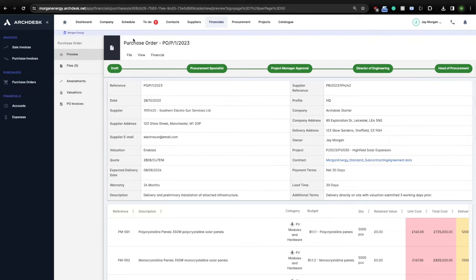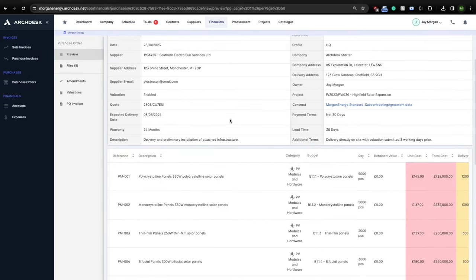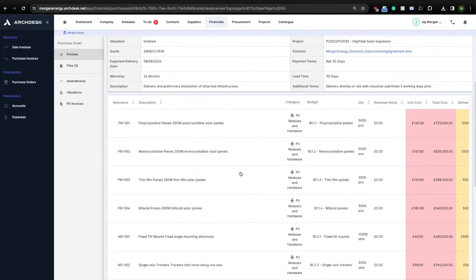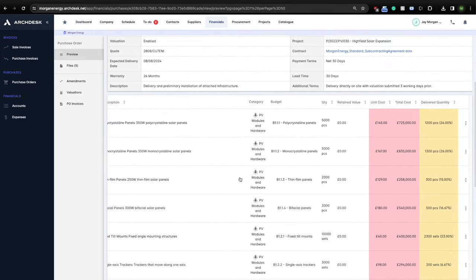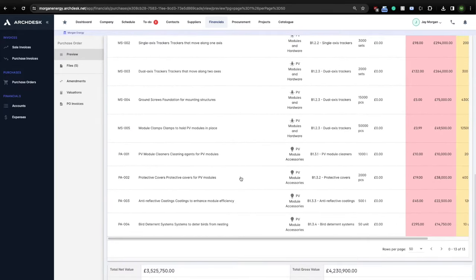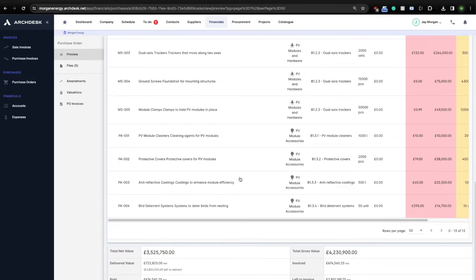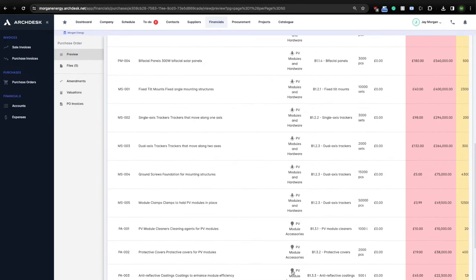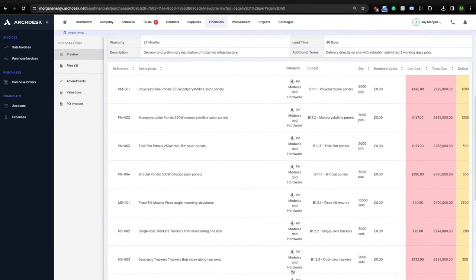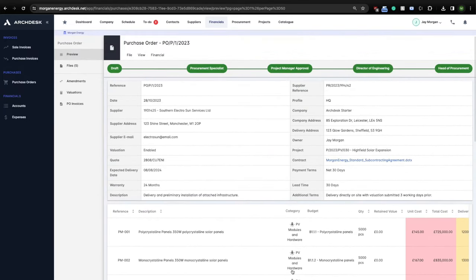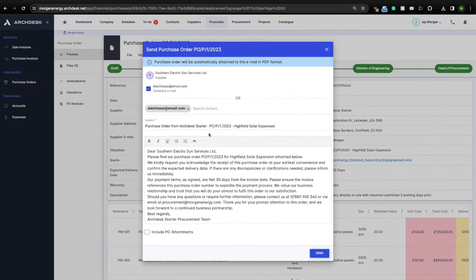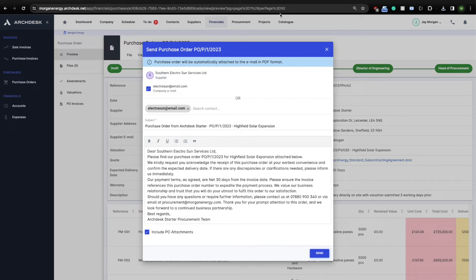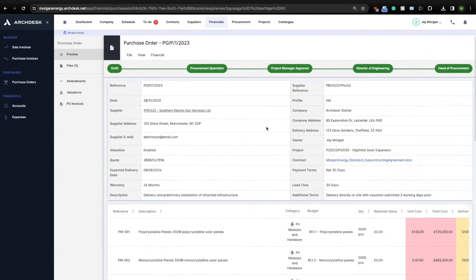Then we have the PO attributes and contracted items with quantities and prices. At the bottom, we have the PO value. The delivered value, then the so-far paid amount. The invoiced value, and finally, what is left to be invoiced by the supplier. ArcDesk, of course, can send those purchase orders to your suppliers, alongside any supporting documentation, and can actually create the legal contract document itself based of your existing templates. ArcDesk procurement module also has an optional valuation feature. If valuations are enabled, ArcDesk will automatically communicate with your supplier and ask them about an application of payments, a materials delivery proof, or a subcontracted work completion report.